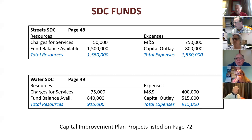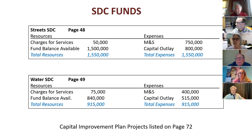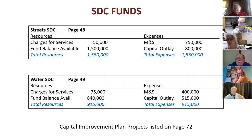Thank you for explaining that. When we do a large project that we're paying the contractor for, the inspector's time is not being charged to the contractor — it's just part of what his salary is based on doing. If there's a large project by a private developer, we charge that developer a fee for a construction permit based on the magnitude of the project, and those fees compensate for the time spent by our inspector or public works people responding and assisting.